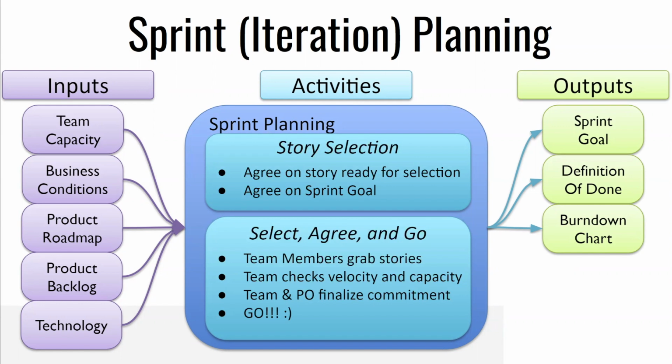So you're going to begin your burn down chart at sprint planning. It kicks it off. So that's the first day. So you want to have that burn down chart ready to go. And you're going to have your sprint backlog, which again is the subset of the product backlog that you're doing for this sprint. So that's sprint planning, in a high level nutshell.